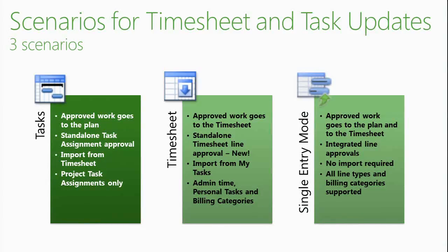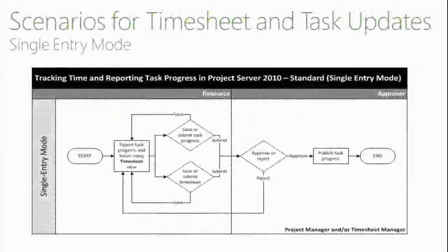And then the same process happens. The project manager has to open the plan or review the updates, approve or reject them, do something with them, apply the updates to the project plan, save, publish, to be able to push the data to the reporting database and the published database so that people can see them in PWA. All right, so this is how it's supposed to work. So a very brief workflow so that I talk about the single entry mode.